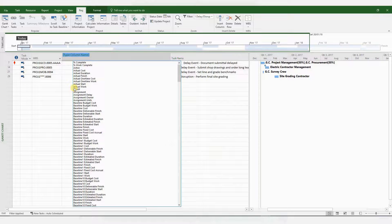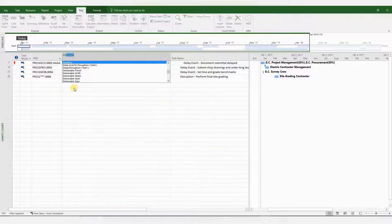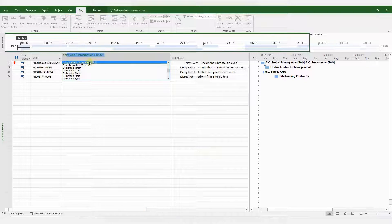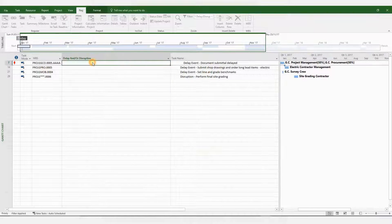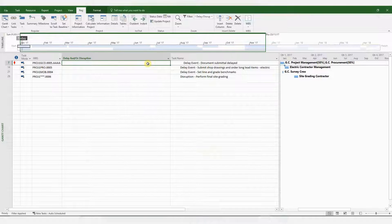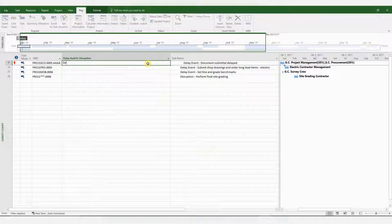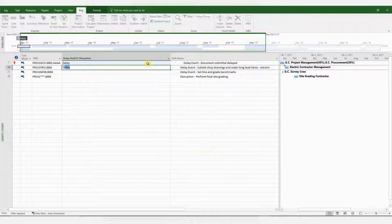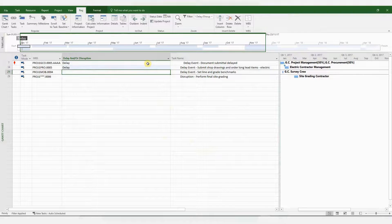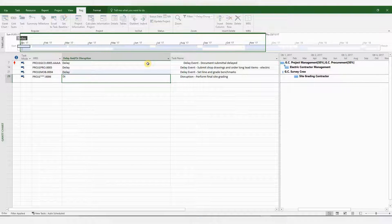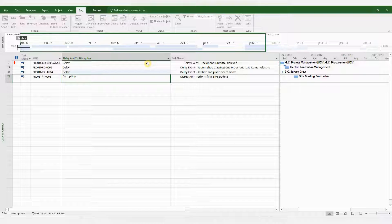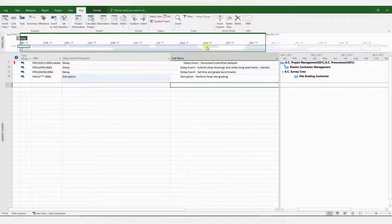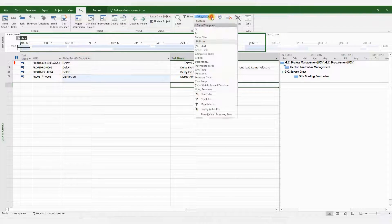And now we need to insert this custom column. So right click, insert column, type in delay, and there we have it, delay and or disruption. Click on that. And populate this column depending on whether the activities are related to delay or disruption. And there you have it.